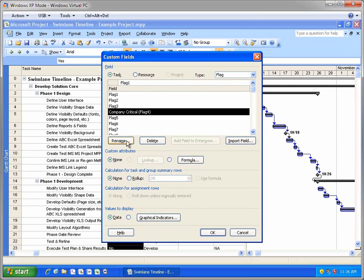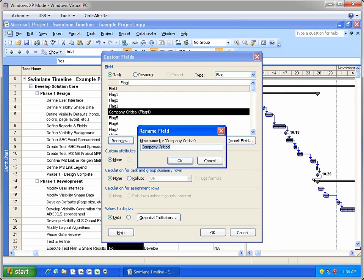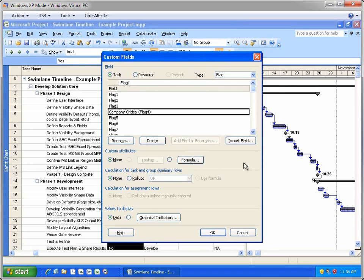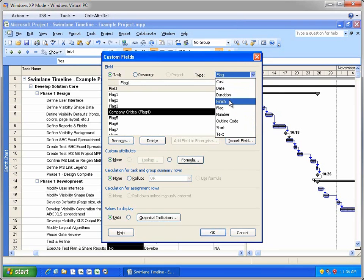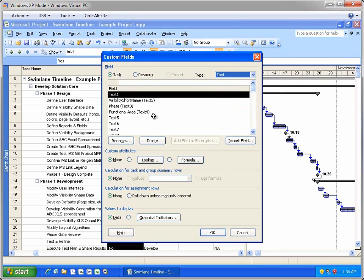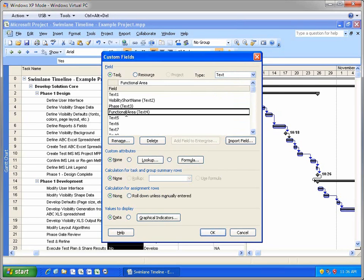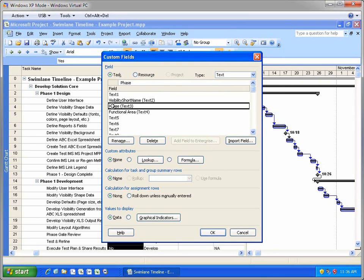It's important that you rename these custom fields so a meaningful name is shown in the Swimlane Timeline. Otherwise, you'll just see the default project field names like Flag 4. There are also custom text fields in this project like Functional Area, Text 4, and Phase, Text 3.